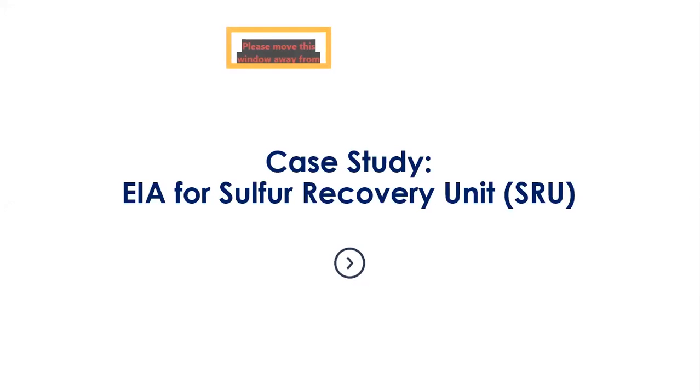Are the mitigation measures adopted 100% foolproof for controlling identified issues on the project in all EIAs? We have to monitor the effectiveness of the mitigation measures. That's why we propose monitoring programs as well, and accordingly we determine the residual impacts, audit and inspection. On that basis we can determine the effectiveness of the mitigation measures. If they are not enough to control the environmental impact, or if there are any changes in the project facility or project description, then we have to update the environmental impact assessment as well.